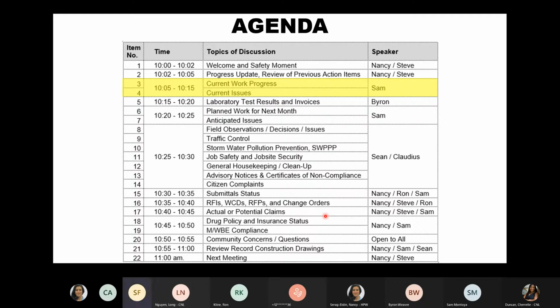So the water leak that Oscar mentioned earlier, that's been repaired. Thank you to SDR, because that wasn't your responsibility, but we appreciate that you did that for us. There was a water leak at a water meter service in front of Foodorama that was leaking after the winter storm, and you repaired that. So that's great. The Houston Metro fiber optics cable is no longer a conflict, because we were finally able to resolve the negotiations, and Pfeiffer and Son are out there starting today, hopefully, beginning their work to relocate the fiber optics cable to the north side of the street. There are no issues with regards to AT&T cables with the south side inlets. I don't believe there's any more issues with that.